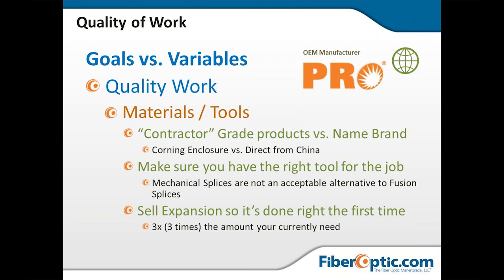It was a match spec type of bid, and it did win that opportunity, but when the customer received that material, the color codes didn't necessarily match up correctly. The fiber works and performs probably as you would expect it to, but it was all gel-filled cable, which took longer to install. So there's a lot of things that go into it.